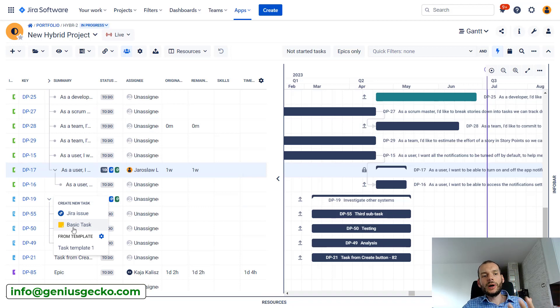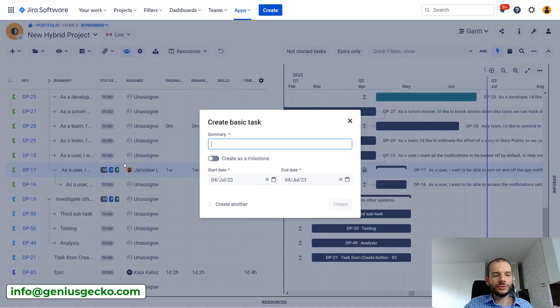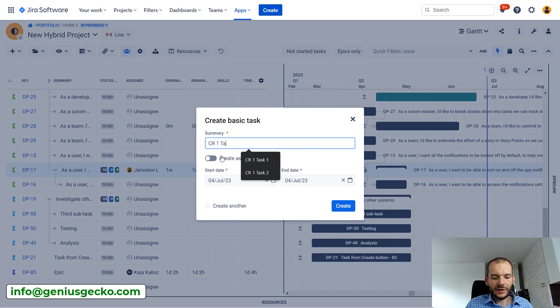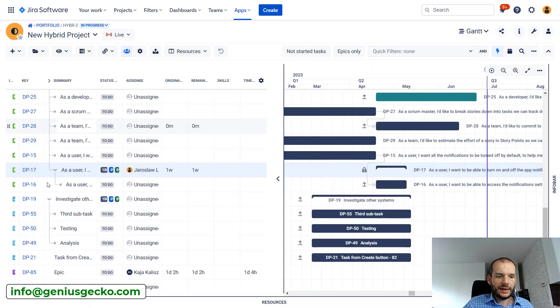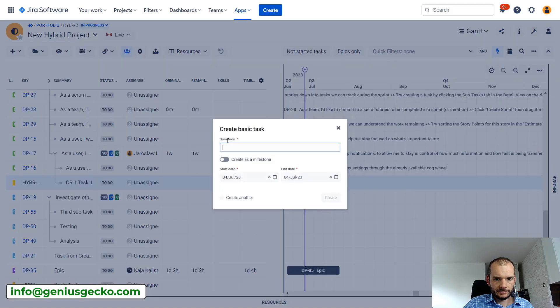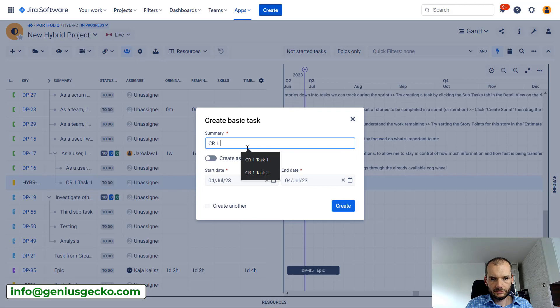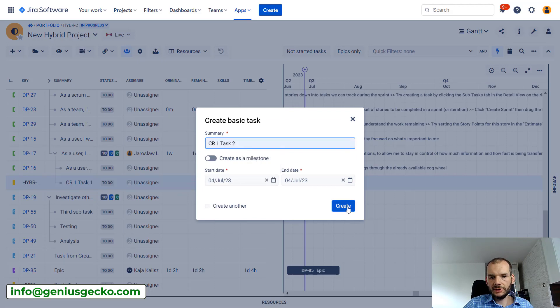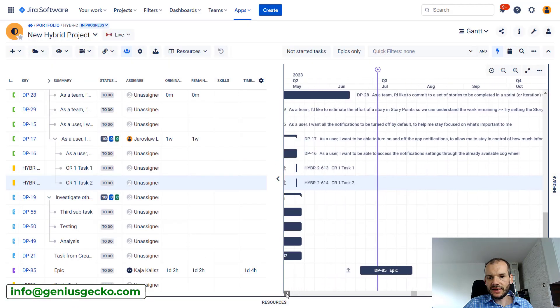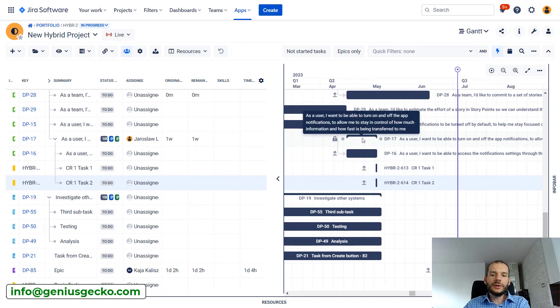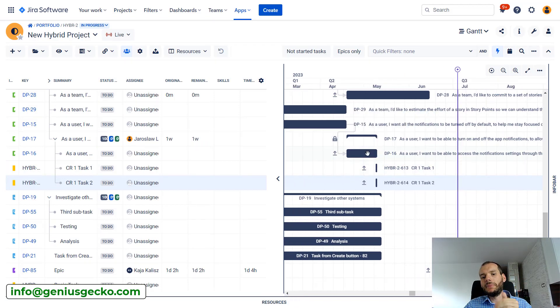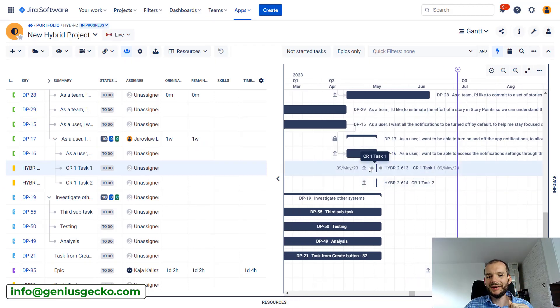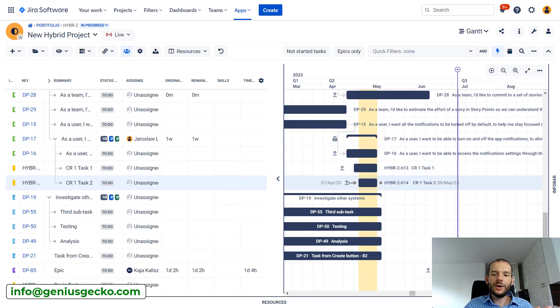And I will create two basic issues which will represent my work coming from the change request. So I will call it simply CR1 task one and CR1 task two. So we have the tasks, they fit under the parent because we've said that the parent has locked period mode and it will not move.